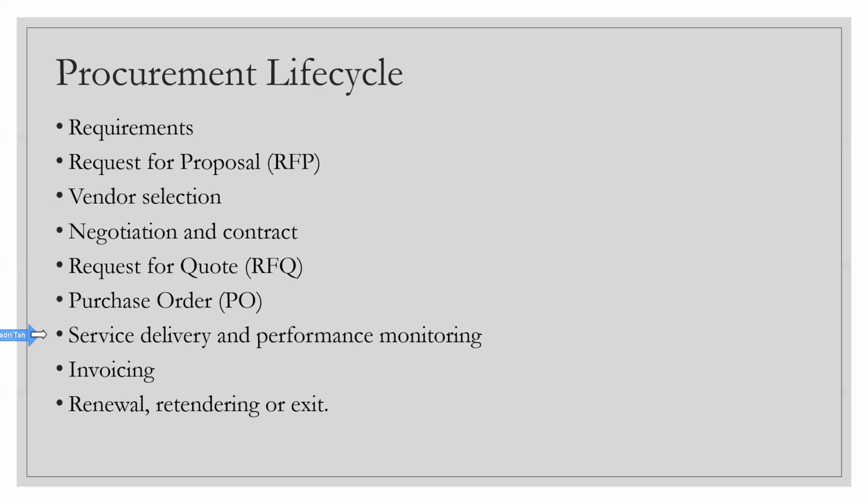And then it will reach the port. Then you have to work on the compliance standards, like from the port, you have to release it. Sometimes the port officer will be asking some questions, and then you take it out, and then finally it comes to your site, and so on. So customs, compliance, all has to be met to ensure that the product is arriving on your doorstep on time.